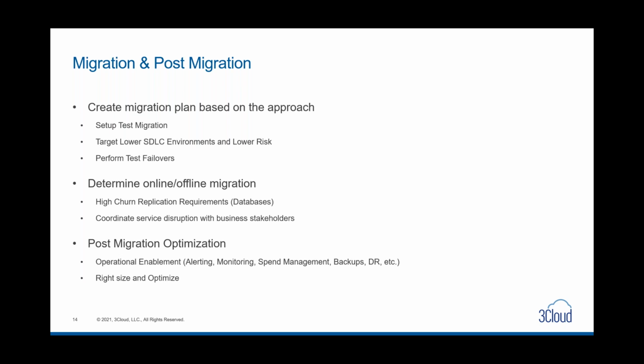And so, targeting lower SDLC environments like dev, test, QA, and working your way closer to prod, that now is an opportunity for us to work out some of those kinks in the lower tier environments before getting to prod. It gives us a comfort level of we know what we're walking into and what we need to cut over, and then what we need to document as a part of updating that game plan.